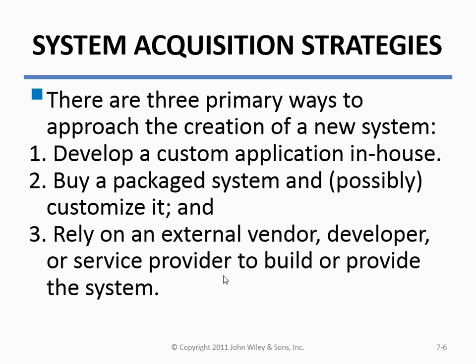Those are the requirements. There are three ways to get that, and you can interchange and interleave them. You can do the work in-house. So if it's a web page, find somebody in-house that does web pages, they build the web page, and you're done. You can buy a package system. For a web page there are lots of templates, and possibly customize it: we want to tweak it, add our own logos, a couple of actions. Or we can say to a vendor, we want a website, make it happen. Broadly speaking, those are the only ways to roll. Sometimes you'll do a little bit of some and a little bit of the other. But in-source it, buy something off the shelf, or buy something custom.